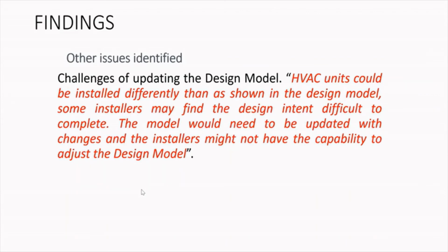Another issue is updating the design model. You could have the design model, and let's say you are happy to do the remodeling. But the problem is, for example, someone mentioned an HVAC unit, which could be installed differently. They came to site and realized that they cannot install the HVAC the way it was designed. They want to install it and then make the adjustment in the model. But unfortunately, the subcontractor cannot adjust the design model. He adjusted his own, but he cannot adjust the design model. So now someone has to take part and do this adjustment.